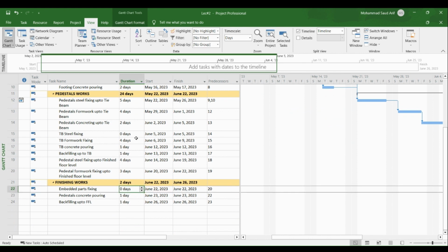First is milestone activity. Make this activity a milestone. So what is a milestone activity? Basically, a milestone activity is an activity that signifies a major event. It is a zero duration activity, and it helps as the signpost throughout the course of the project.